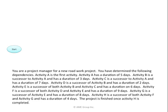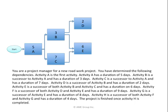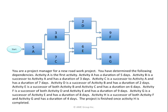I begin with the start. Activity A is the first activity with a duration of 5 days. Both activity B and activity C are successors to activity A, and I fill in their durations. Activity D is a successor to activity B with a duration of 2 days. Activity E is a successor to both B and C with a duration of 6 days. F is a successor to D and E with a duration of 9 days. G is a successor to E with a duration of 8 days. H is a successor to both F and G with a duration of 4 days. The project is finished once activity H is completed.